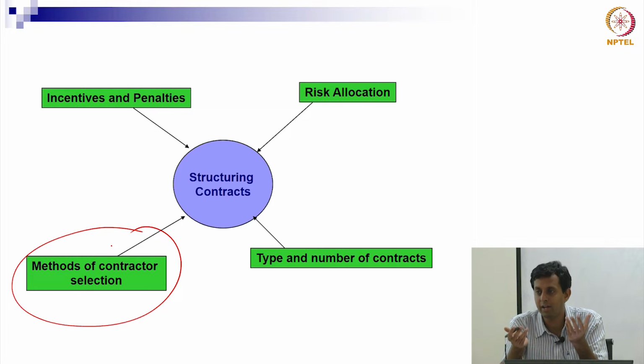How do you evaluate the technical? Somebody can easily come in. One of the easiest tricks in the book is to say, here are the people that I'm going to bring on this project, and you bring all the all-stars in your company and put them on the project roster. But when the project actually starts, those people are working for your company, but they're not day to day on the project. They're available for phone calls, whatever it is, but not day to day. So sometimes just looking at technical qualification is tricky. People put in resumes, but those people may or may not necessarily show up.